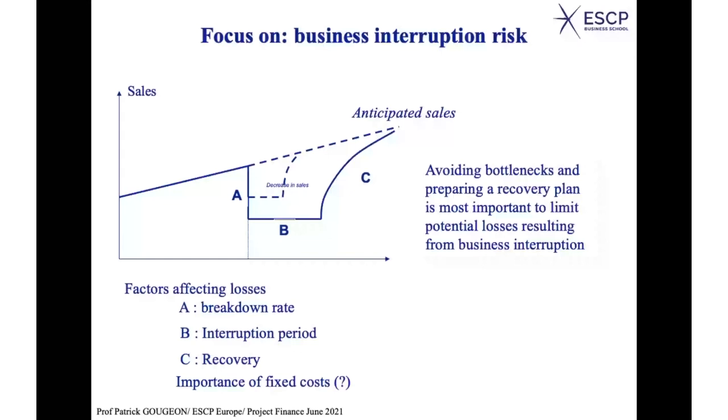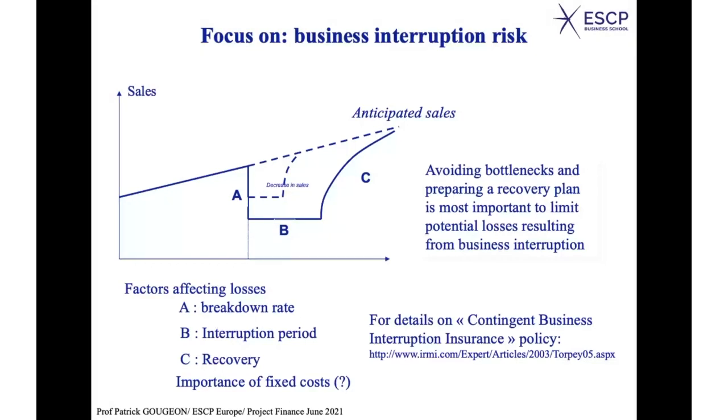You know, usually, for instance, if you ship a new equipment to recover fast, if it takes, for instance, 3 weeks for the transport period, maybe rather than doing it by sea, you can do it by air. It will be more expensive, but the extra expense will be worth spending because you may reduce by 3 or 4 weeks the delay to get your new equipment. Okay, and this can be covered by the insurer because the insurer will also gain by reducing the period of indemnification. Okay. So what are the main causes of business interruption?